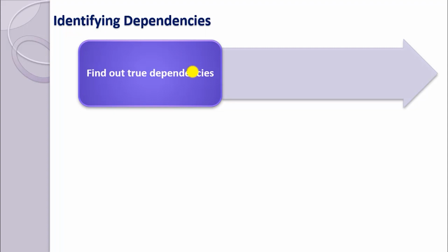So we were definitely dependent on them for fixing certain patches. The interfaces and the customization were done by my team, but if there was anything to be changed in the core logic, we were dependent on the core team. But the core team was loaded with other clients' work, so it could happen that they get back to you in 4 days, 5 days. So it happens. When you work in such a project, finding out the true dependency is very important, and you need to have contacts so that you can get things done very quickly. So all these things happen.